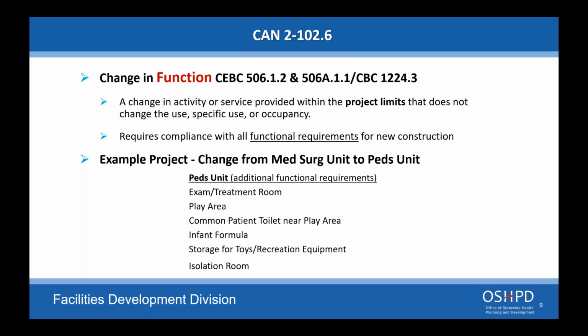If you're replacing the unit and there's different requirements, those requirements are going to need to be met. Again, for an emergency type project, you may be able to do some of the work prior, but only with the RCO's blessing, permission to do so, and it will need to be fully compliant once it is completed. So you want to make sure you know what's expected and that it's engineered correctly when you're installing it.